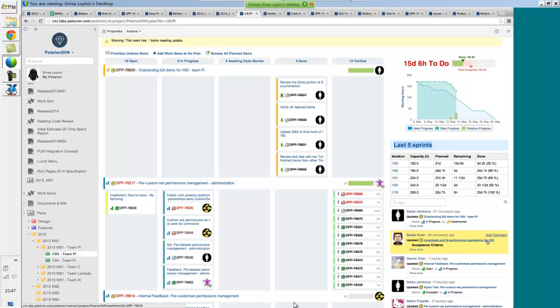Then the way it's done is based on the backlog, and we'll visit our backlog a bit later in the presentation. We pop in the most important user stories for each team, and each team is usually working on one specific feature. Plus, they have additional tasks such as defects, localization, and anything else that we consider maintenance.